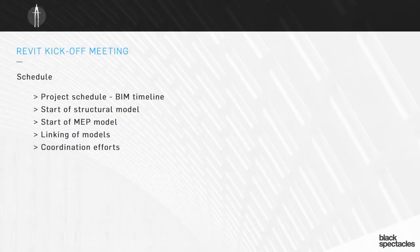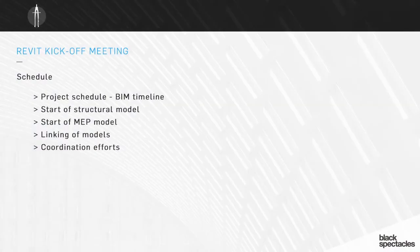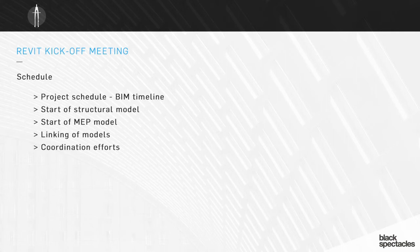Lastly, talk about schedule — not only the overall project schedule but the BIM timeline. When are you starting models? When do you expect to start linking models together? There will be a lag time between when you start a model and when it has enough information to start linking into other files. Typically the architect is the first team member to start a Revit model, with the structural and MEP engineers following a little later. Mapping out that timeline — when each discipline starts their model, when you start linking models together, and when coordination efforts begin — layered on top of the overall project schedule gives you a much better picture of how everything will work.